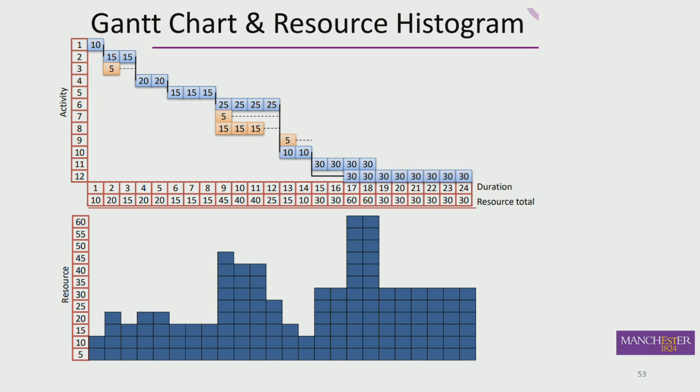So you've got different resources. Now, there's something which you might realize when you look at the network diagram. What tends to happen in projects is that you build your plan, and did you notice at the beginning there wasn't much work going on? And then as time went on, more and more work developed, and then the work petered out in terms of finishing activities. That is typical of projects. So much so that you get lots of resource in the middle or in particular parts of your project, you suddenly find you've got lots of people working on different things.